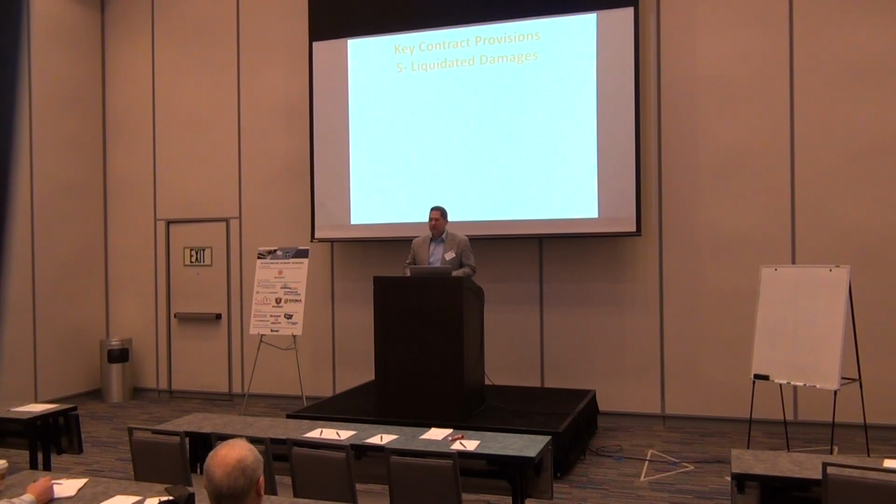All right. Liquidated damages. They're always fun, aren't they? That's something else I would always look for in every contract because in the event of not meeting a performance date, it's going to be an argument, and owners and general contractors, owners primarily I would say, love to enforce some kind of liquidated damages. So basically what it does is it obligates a contractor to pay a specified amount per day following substantial completion if the project's not done. And the amount is something to look at.